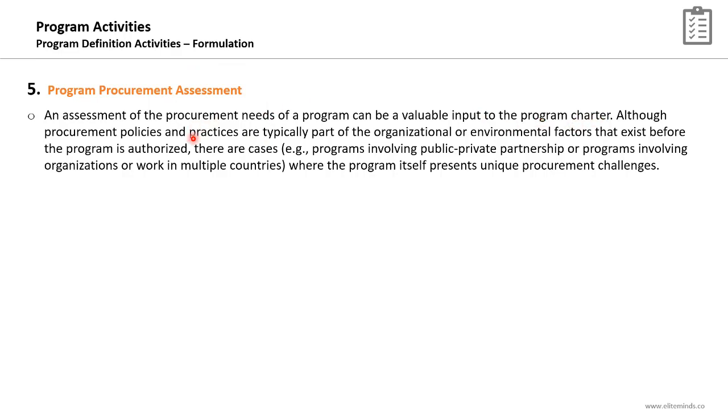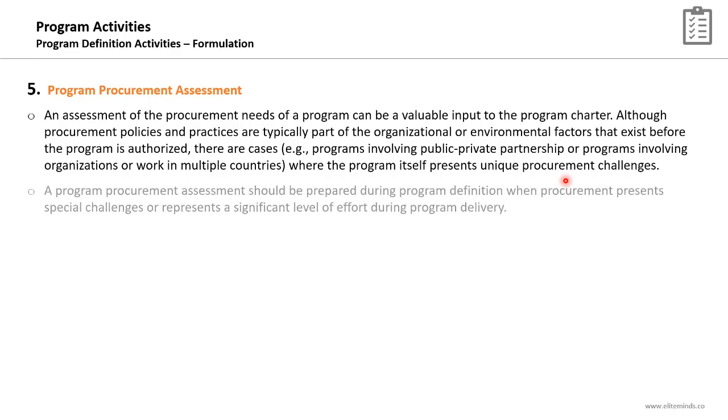Although procurement policies and practices are typically part of the organizational or environmental factors that exist before the program is authorized, there are cases where the program itself presents unique procurement challenges, and we need to spend a good amount of time and effort on this supporting activity if we are expecting procurement challenges in our program, or if we are expecting that the majority of the program scope will be executed by vendors.